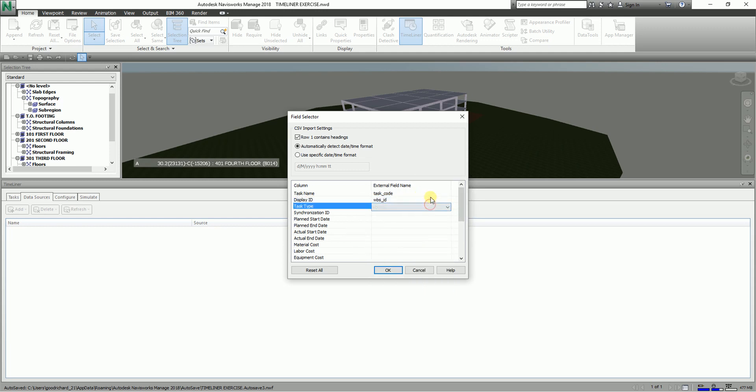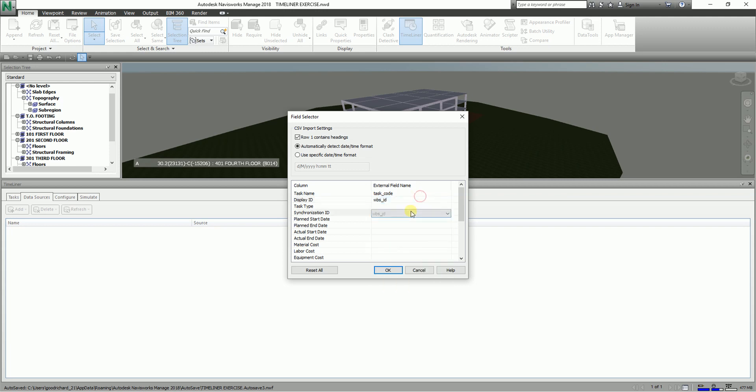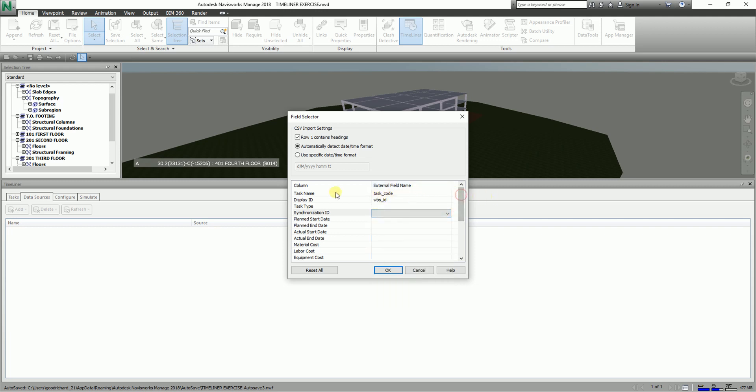So these are actually the fields that are available in your data source, the data sources that you have added. You can actually specify also here, but for this one I'm just going to specify the external field name for our task name and display ID.